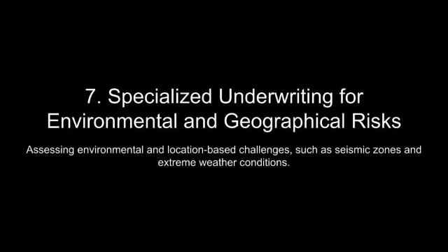For example, if a subcontractor defaults or fails to meet performance standards, the contractor remains liable to the owner, potentially triggering claims against performance bonds. Underwriters must evaluate the financial stability and track record of key subcontractors, as well as the mechanisms in place for dispute resolution and performance monitoring. This analysis is particularly critical in projects involving multiple tiers of subcontracting, where communication and accountability challenges are amplified.